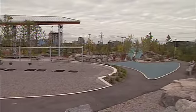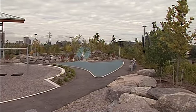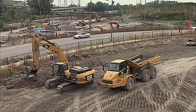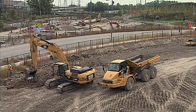The parks and the public realm work like a structuring framework for the precinct. So we demolish the sites, then we build the new roads, the new streetscapes, the new parks, and that acts as a way of organizing the site for future development.